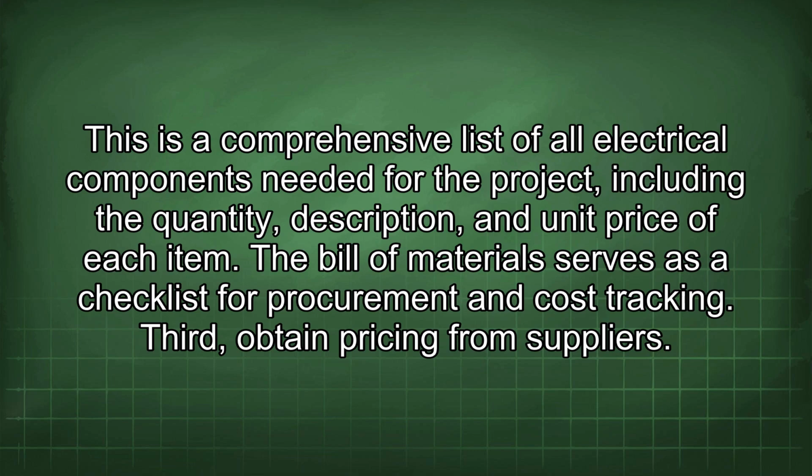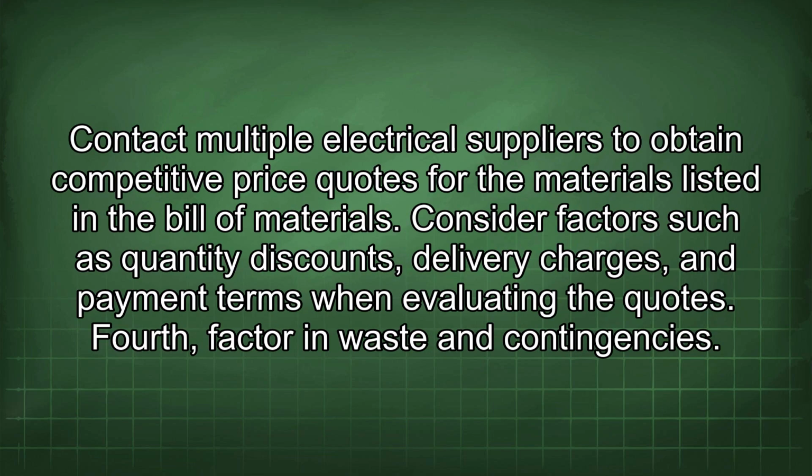Third, obtain pricing from suppliers. Contact multiple electrical suppliers to obtain competitive price quotes for the materials listed in the bill of materials. Consider factors such as quantity discounts, delivery charges, and payment terms when evaluating the quotes.